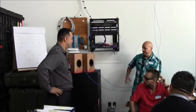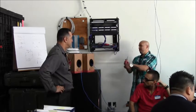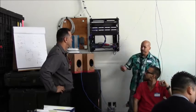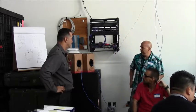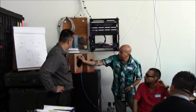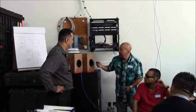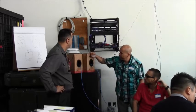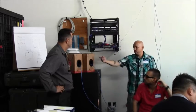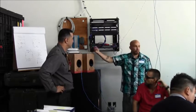And then with the new string, just cut off the old string. Make sure you cut it off, tie it onto the MDF side, and then get your next head ready. Like the next one, you cross this out because it's old now. Now you put 1C, and then 1B. Now you're ready. Usually I circle it to let me know that that cable run is still going. Then I'll read it off from there, and when I'm done, I cross it out and start with a new one.